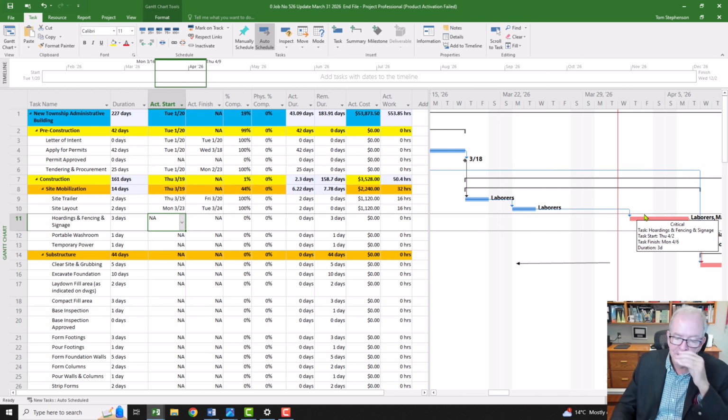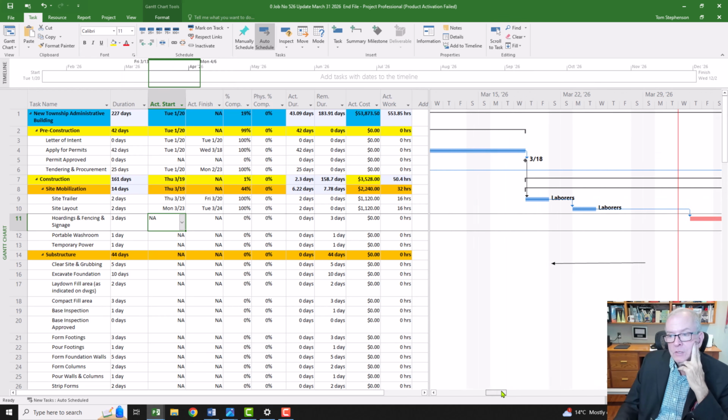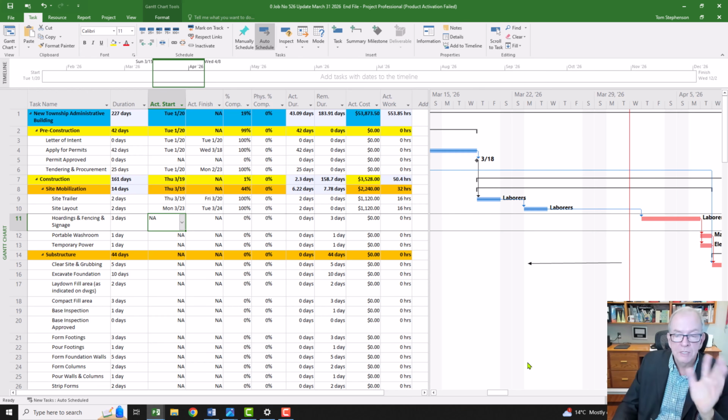So I have that on the checklist, right? Reschedule it to where the expected start date is, because you know what? It would move everything else on the critical path if that was the case. So we want to see what it's impacting. We want to make sure that we've done that for everything on our update process. We want to make sure that everything that was done is before the actual start date.